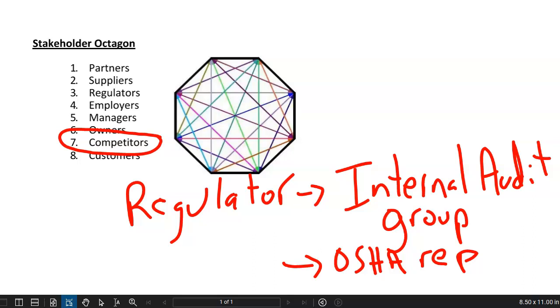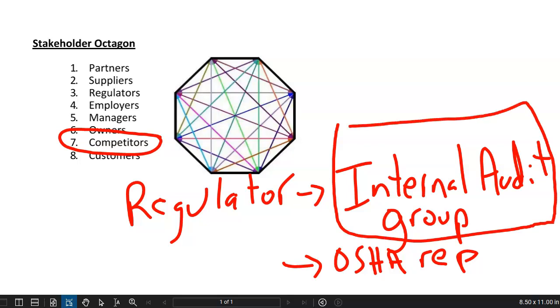I just let team members know about it in advance. They bring each of these as separate post-it notes. At the beginning of our brainstorming session, we post those post-it notes first. That creates the beginning of our list, and we then add to that post-it note list with our brainstorm ideas. It's kind of a modified brainstorming and generic model combination approach, most often the technique that I use. There is a third technique, though, that I want to make sure we mention. Let's look at that one next.